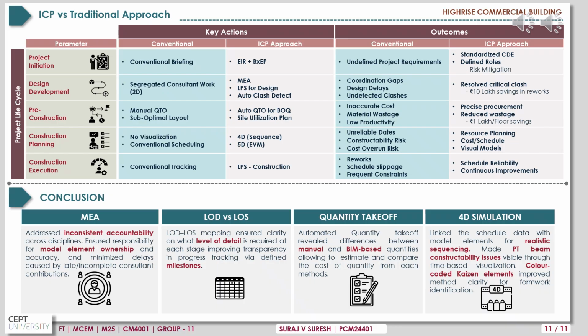Now coming to the quantity takeoff, the automated quantity takeoff using BIM was performed and the results were compared against manual quantities. The comparison revealed the differences between manual and BIM-based quantities, allowing the team to estimate and compare the cost of quantities from each method.